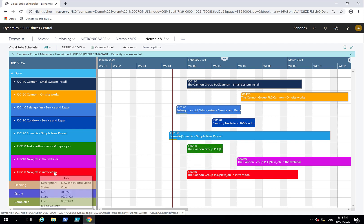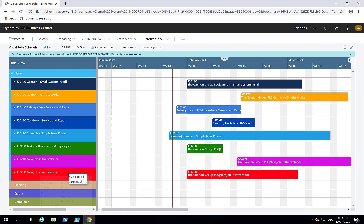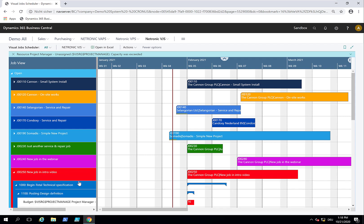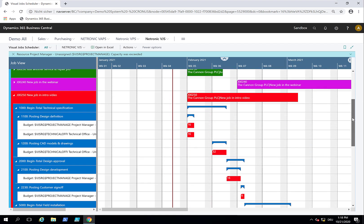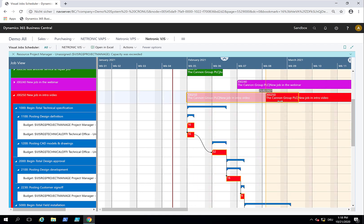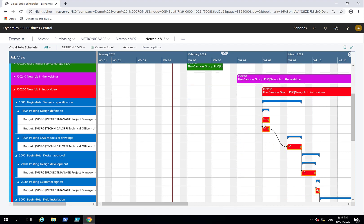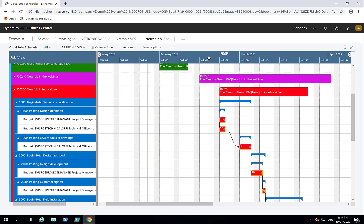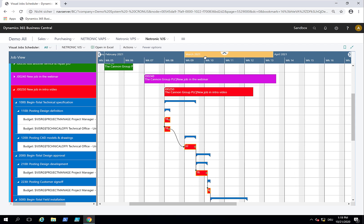Now the first thing we can do is time schedule it. Let me expand it. We know this job will not happen before the end of February, so I want to move the entire job to beginning of week eight. The whole chain of underlying job planning lines and job tasks got moved.